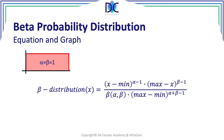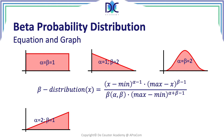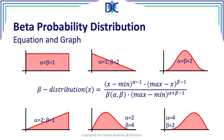When alpha equals beta equals 1, we have a uniform distribution where all random variables have the same probability. Alpha equal to 1 and beta equal to 2 gives a triangular distribution with the mode at the minimum. Alpha equals beta equals 2 gives a normal-like distribution. Alpha equal to 2 and beta equal to 1 gives a triangular distribution with the peak at the maximum. Alpha 2 beta 4 is skewed to the right, and alpha 4 beta 2 is skewed to the left.